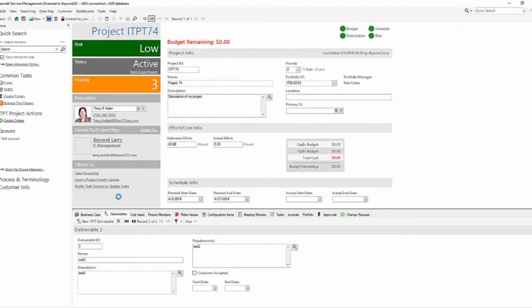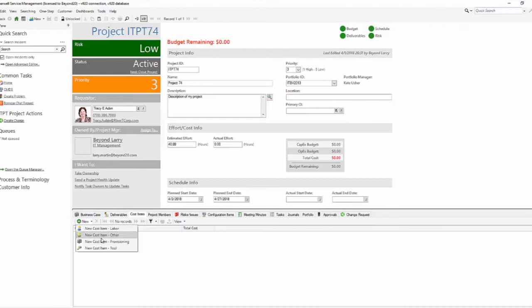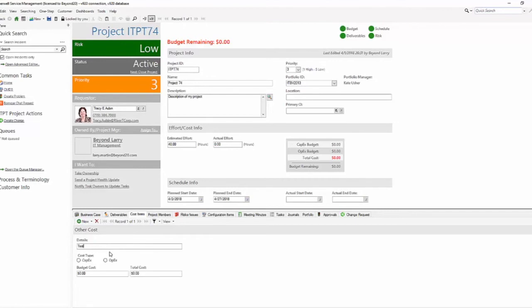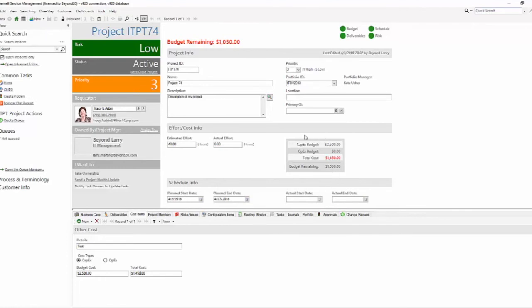Next we have the ability to track cost items. We can add a cost item with labor, other, provisioning, or tool. Obviously you can create your own and update these. Cost item other, we're going to say it's a test. Was that a capital expense or an operational expense? Obviously you might want to change these labels so they're a little more self-explanatory. As you can see up here, we've got our capital expense budget and our operational expense budget. For this one we're going to say it's a capital expense and we budgeted $2,500 and we spent $1,450. Once we save this, now we've got our record up here showing our capital expense budget to date is $2,500 and we've spent $1,450 of it.